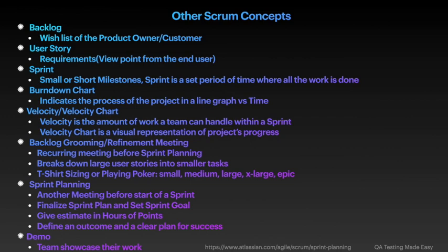Dev 1 takes this particular login page ticket. Scrum Master asks him, what is your estimate? He says 10 hours. That's 2 days worth of work. How is that calculated? 1 day is 8 hours, right? There are meetings and so on. So 3 hours allocated for meetings and other activities and 5 hours for real work. Let's put it that way.